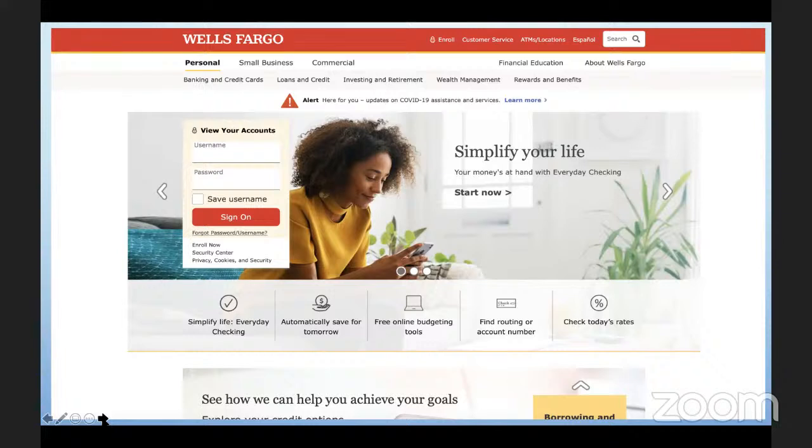It's a big bank. But again, the point I'm trying to make here is that they have a lot of features and a lot of tools on their platform, and for how they build it, the delivery model, we can use Agile incrementally. So today we'll build personal banking features. We go to small business, commercial, financial education, day by day, step by step, incrementally, and we can have all these features built out, right? We don't have to take 3 years, 4 years, 5 years before we build all this platform together and then say we're going live. We can pick features by features, one thing after the other, and then we have a platform like this, as Wells Fargo Bank.